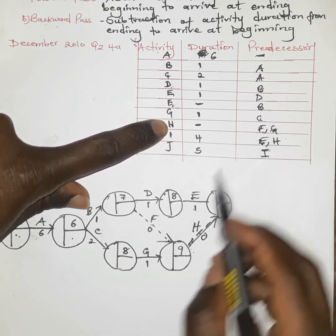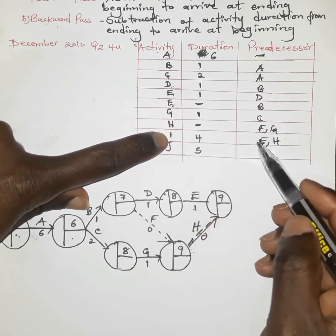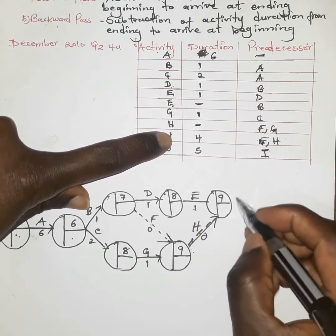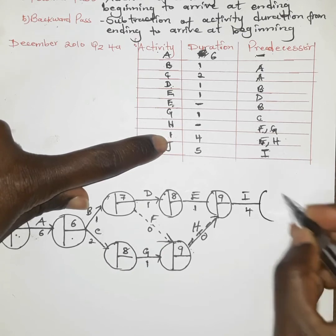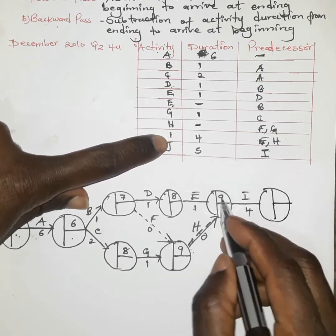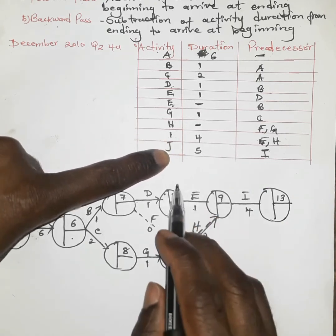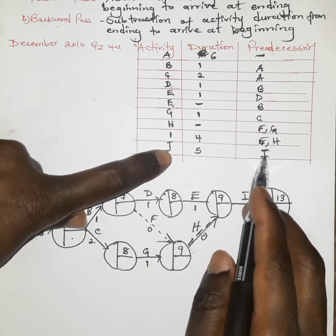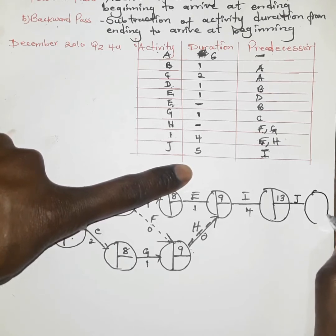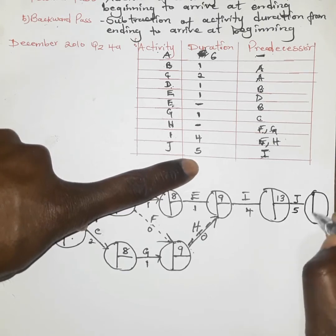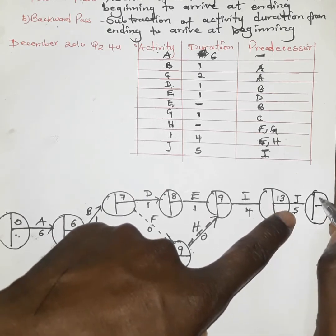Now we have E and H converging. The moment E and H are completed, we have activity I, which takes a duration of four weeks. The duration taken by the last activity plus I gives us thirteen. The last activity, which depends entirely on I, is J. Activity J begins as soon as I ends and J takes five weeks, meaning the whole project duration will take thirteen plus five, which is eighteen.